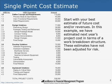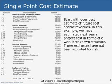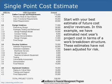When you make a long-term investment in something, like a project, you're going to come up with your best guess as to how much money you think it's going to cost over the life cycle of that investment. In this example, we have an IT investment — a software development project — and we use a work breakdown structure to break it down into four phases: define concept and requirements, design the product, develop the solutions, and implement it. What we want to do is risk-adjust this single-point cost estimate.